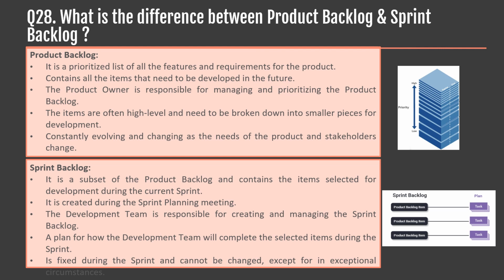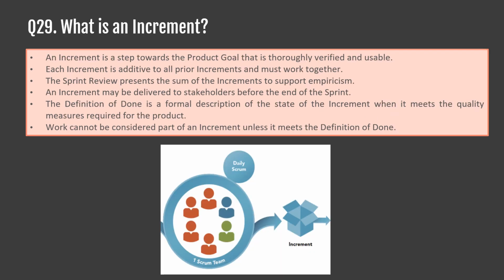During the sprint review for Sprint 1, the Scrum team would have demonstrated the working browse feature to the stakeholders and received feedback. So, the browse feature would have been part of the product backlog and then added to the sprint backlog for Sprint 1. Similarly, the ordering feature would have been added to the sprint backlog for Sprint 2 and payment integration for Sprint 3.